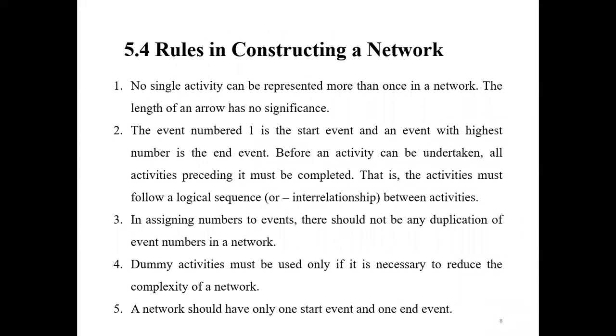Fourth one, these are some rules. This is for your reading. Let me read it once. No single activity can be represented more than once in a network. The length of an arrow has no significance. Some may draw it short, some may draw it long, but the length has no significance of time.